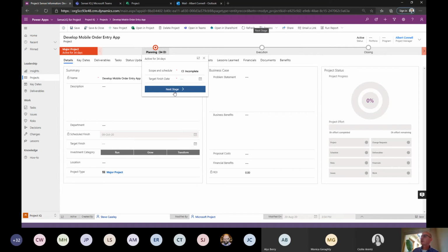The reason why we generally do this through Active Directory groups is because it's a consistent way for us to ensure that even if I assign, let's say, Joe Blocks to a particular stage gate and Joe Blocks leaves, well, who would then approve that stage gate? By incorporating that into Active Directory groups, anybody within that group could approve that. But really, technically, there's no reason why we can't associate an individual resource to approve those stage gates.